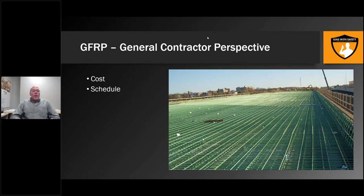All right, hello, my name is Kevin Gothberg. I am a lead project engineer for Kokosing Construction Company. We are a good-sized general contractor in the Midwest and some in the Mid-Atlantic. So in any event, from a general contractor perspective, rebar for the most part for us is a pass-through cost. We will get a price from the supplier to furnish the material. We will get a price from the rebar subcontractor to place the material. Typically, the general contractor costs are the rebar supports, which there will be no change between GFRP and steel, and then our unloading and hoisting costs.